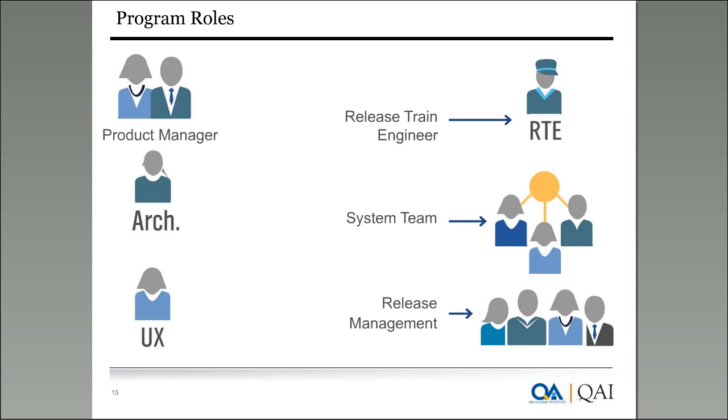There is a Kanban way of tracking these things, and you have a Kanban board at the program level, the value stream level, and the portfolio level, which gives visibility on all these backlogs at different levels of abstraction and how they are getting built. So that is how the backlog implementation happens.